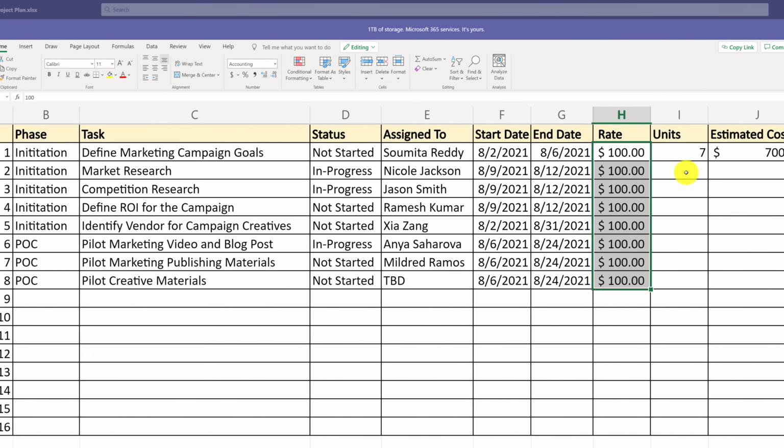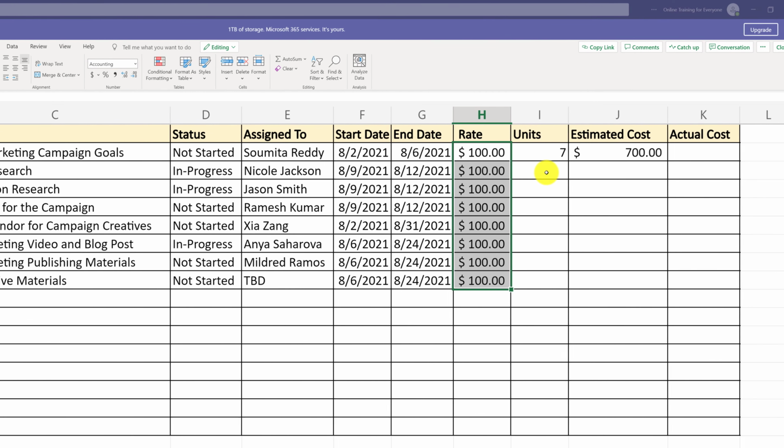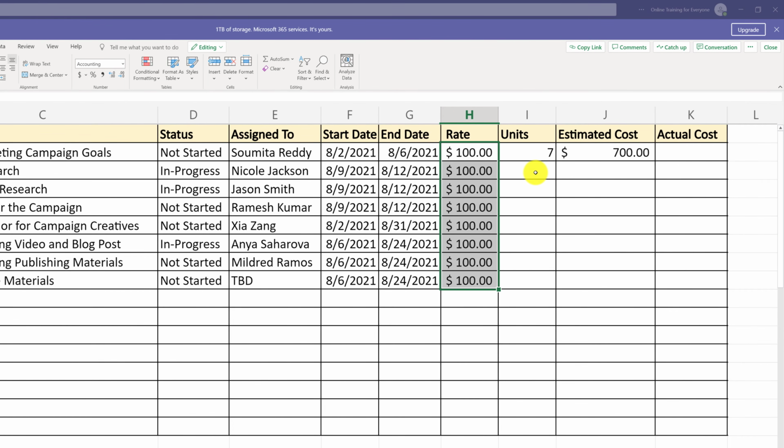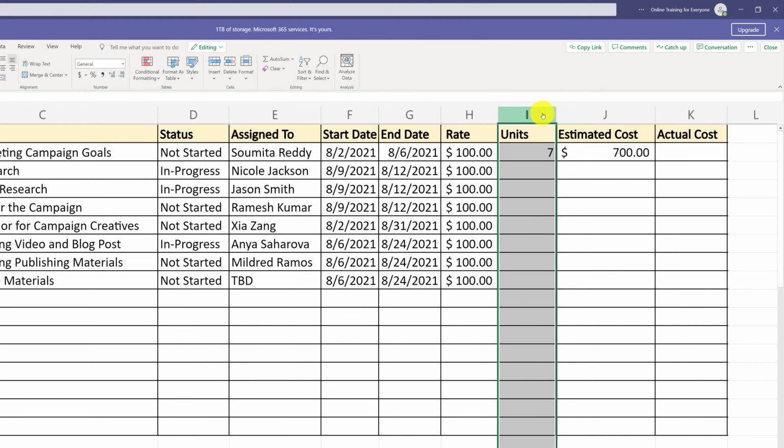The mastery of the experienced project manager typically comes in with the experience to estimate the tasks. Here in the column I, we might want to put the estimate of how much time this particular task will actually take to complete. There are different rules and different ideas how this could be estimated. For contractors, typically you would want to put actual hours, basically the effort for the work.